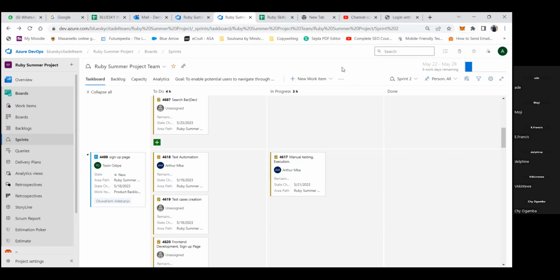If it's 3 hours per day for Segun, I've explained to you that if he puts more hours in the task, it might either overcommit, where, like I said, it turns red, we didn't have that situation, or it remains green, or undercommit, whereby he's using little hours out of the more hours that he has. And your chart is the one that picks up all that information. So instead of you opening up the work details and calculating, your chart is calculating everything and giving you a graphical representation of what is going on on your board.